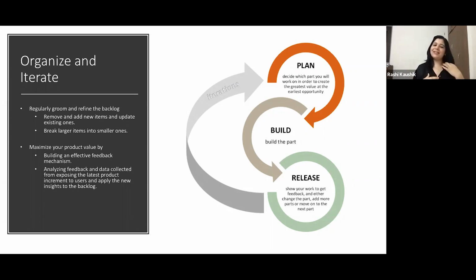And what you have created is the first iteration of your backlog. In no time, this will become outdated if you don't refine or groom it regularly. So make sure you groom your backlog regularly by removing what is not required, adding new items to your backlog, and updating the existing ones. Also take time to review the larger items and see, if possible, break them down into smaller ones.